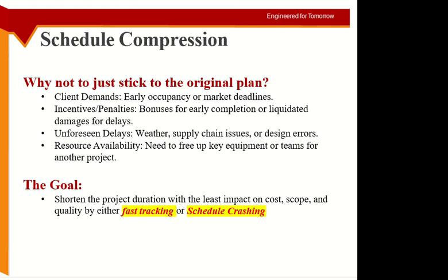Unforeseen delays: you are going according to plan, but you faced a delay because of safety issues, because of a change in the design, because of a material shortage, because you were expecting something that was coming from some other country, and it did not reach in time. So you were actually trying to go according to plan. So the compression is not initiated by you, but now a delay has happened. So in order to keep with the deadline, with the plan, you have to do compression. So without compression, you may not.